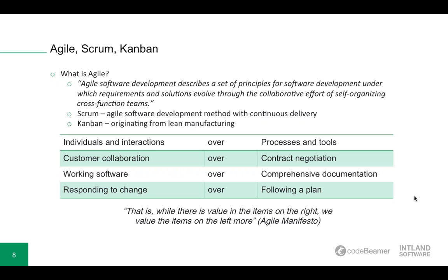It is a time-boxed, iterative approach to software delivery that builds software incrementally from the start of the project instead of trying to deliver everything all at once near the end. It works by breaking projects down into smaller bits of user functionality called user stories, prioritizing them, and then continuously delivering them in short tweak cycles called iterations or sprints. User stories are features which the clients might one day like to see in their software. And the most important part here is continuous delivery.